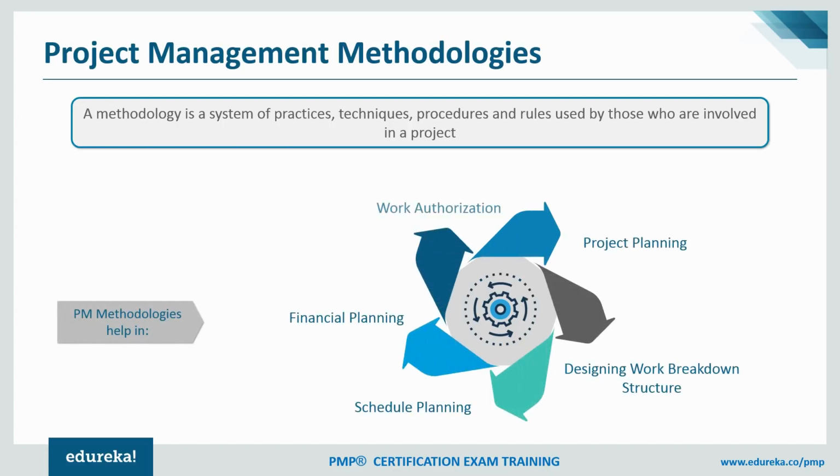Certainly, one of the benefits is work authorization. You may be using certain tools currently while working on projects, maybe MS Project, or for that matter, Workbench is another one, or there is a tool by CA by the name Clarity. Some of these tools are really useful in creating work authorization systems. Once we identify the project scope, we break down that scope into activities and tasks, and then we assign those tasks to different employees or associates. And that's how we get into the work authorization process.